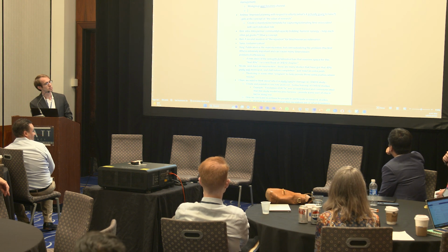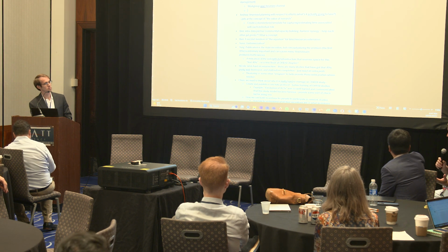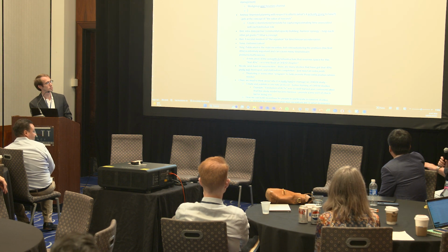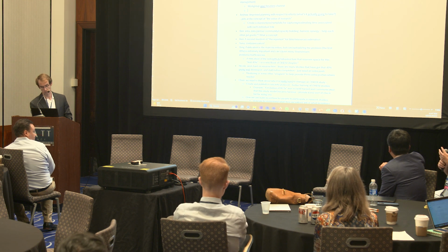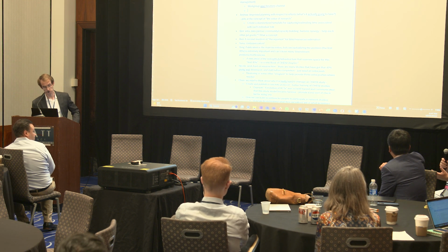I think in general, misspecifying the amount of work in projects is a thing. There's a huge area where people study that and how to improve it. In general, you project, you say, well, I think it's going to cost this amount of time, this amount of effort. And then you see how much it actually does, and you're different. And then you iterate on why it's different, and gradually you get better.